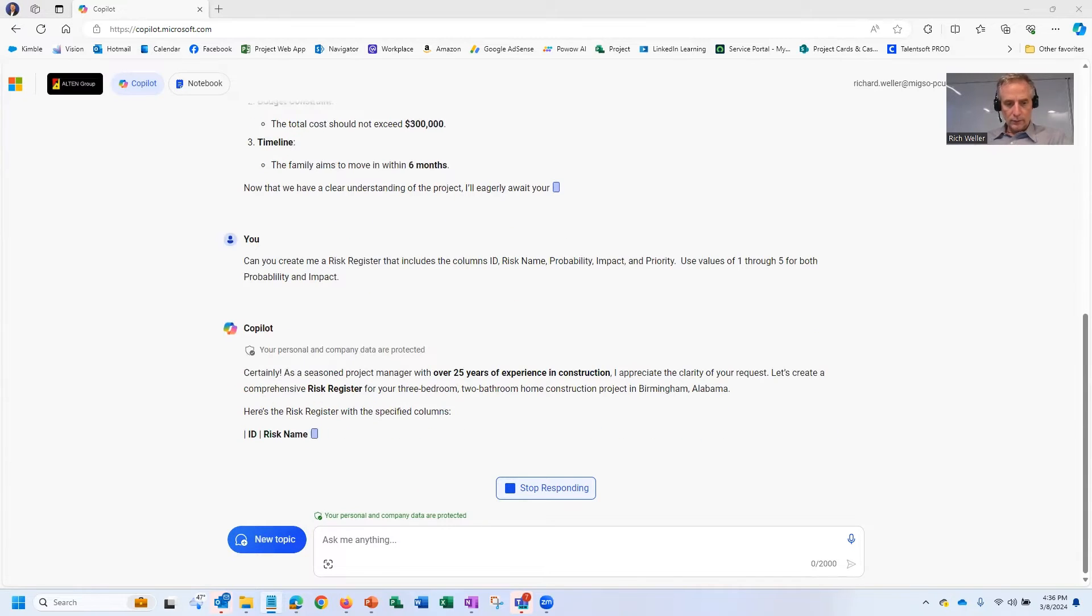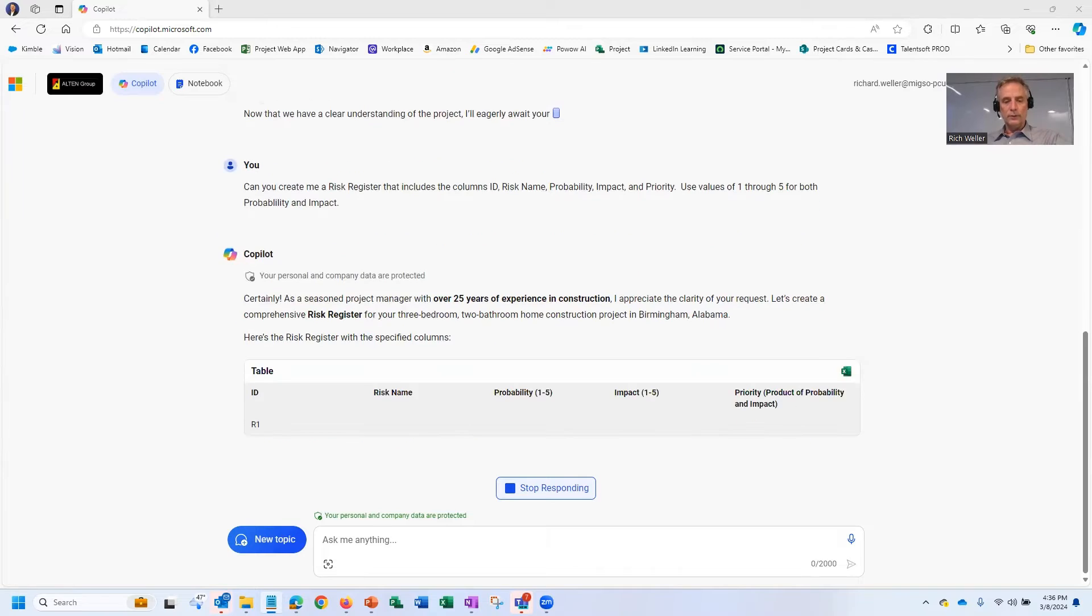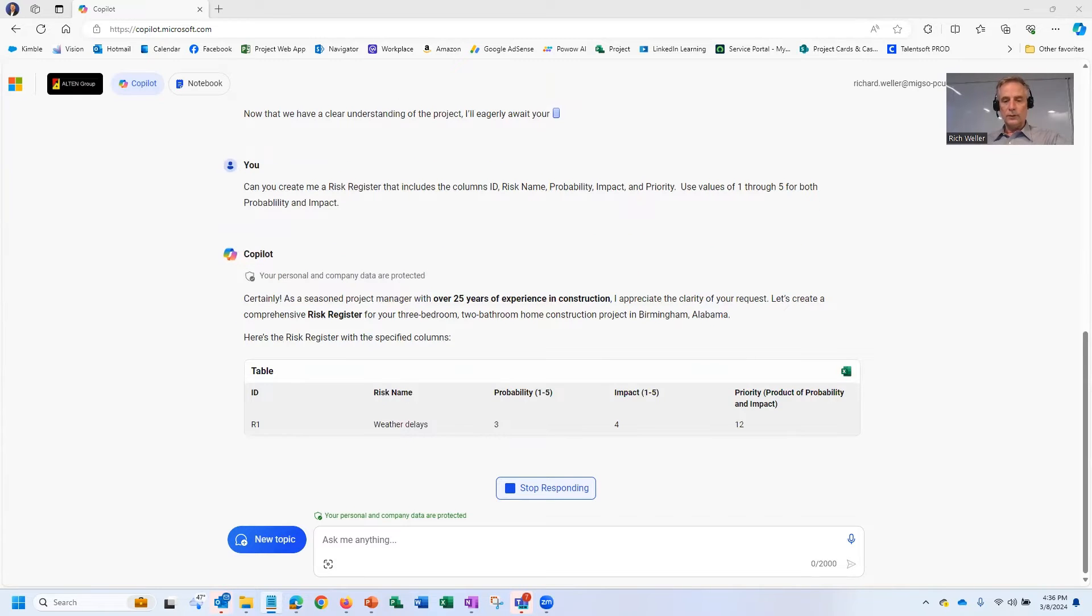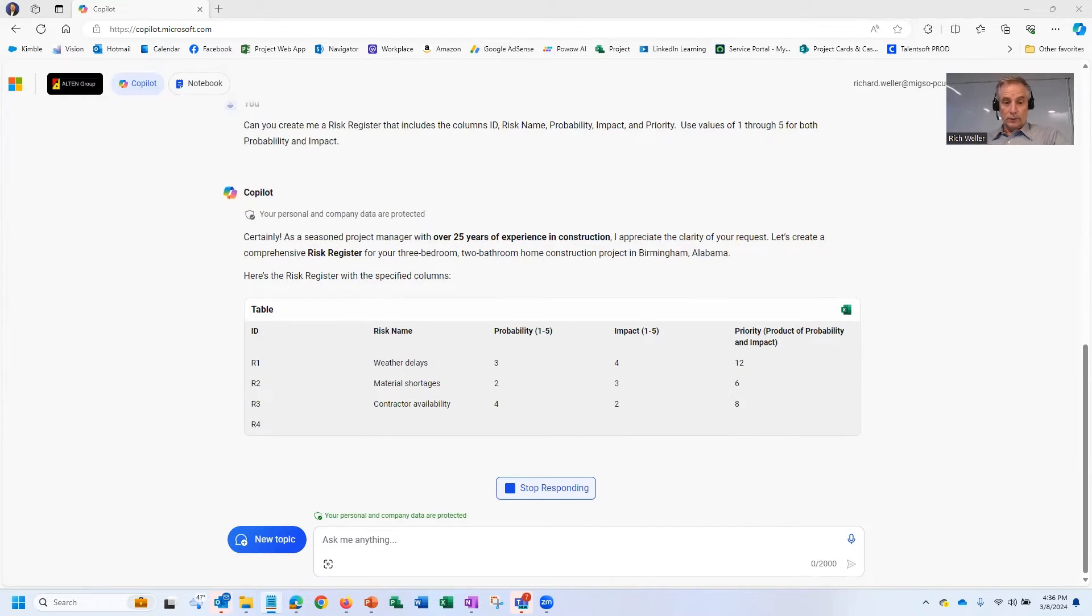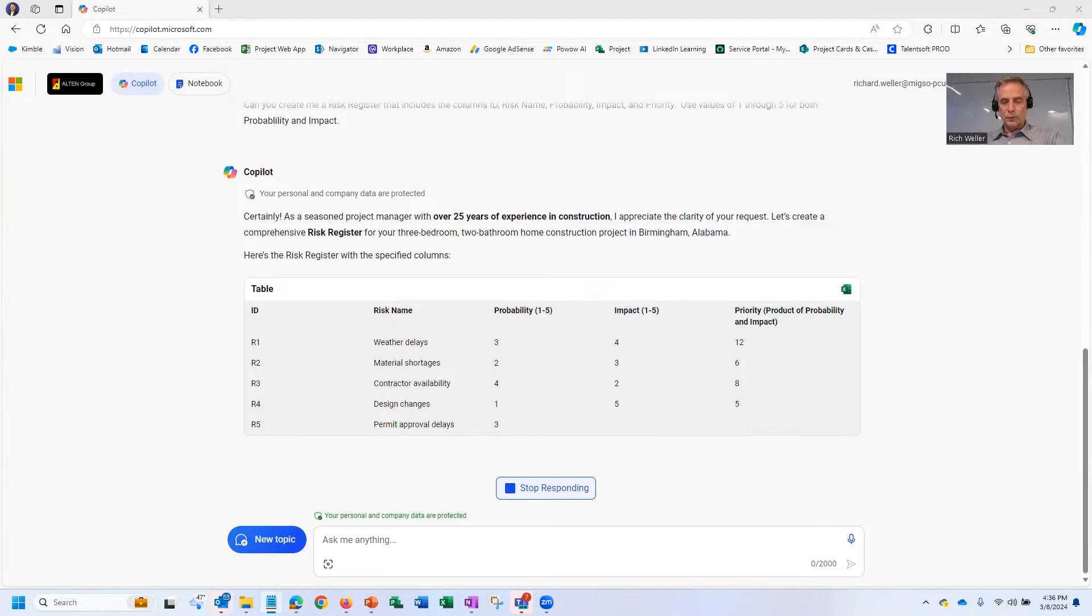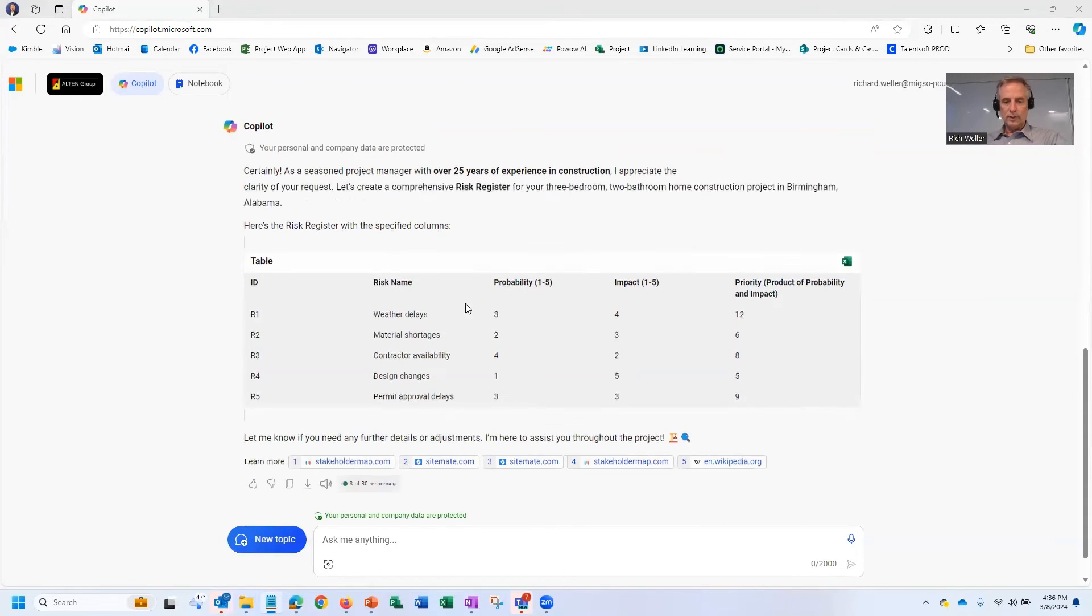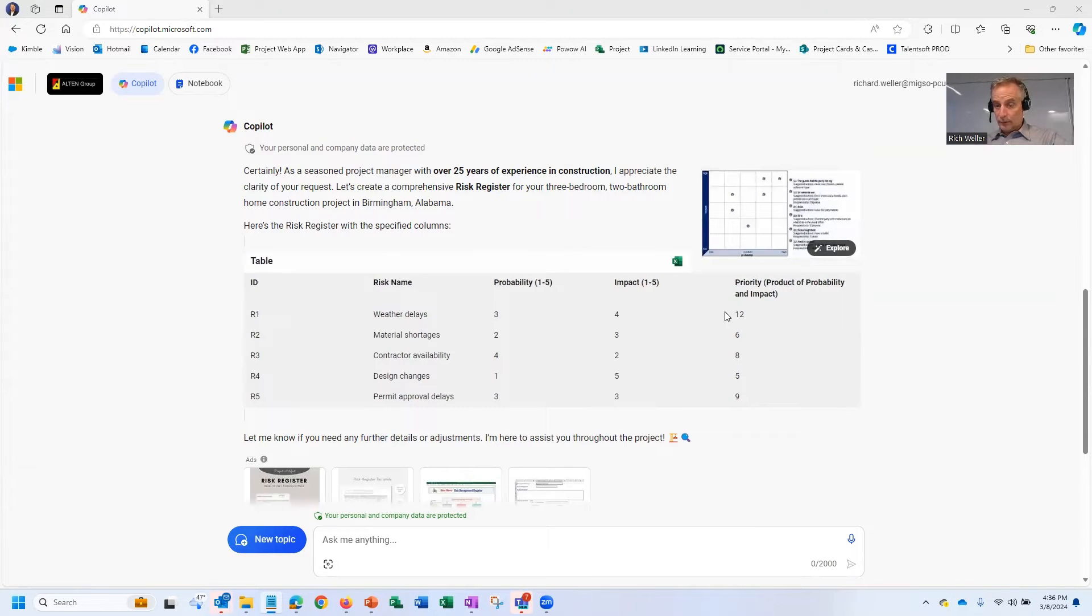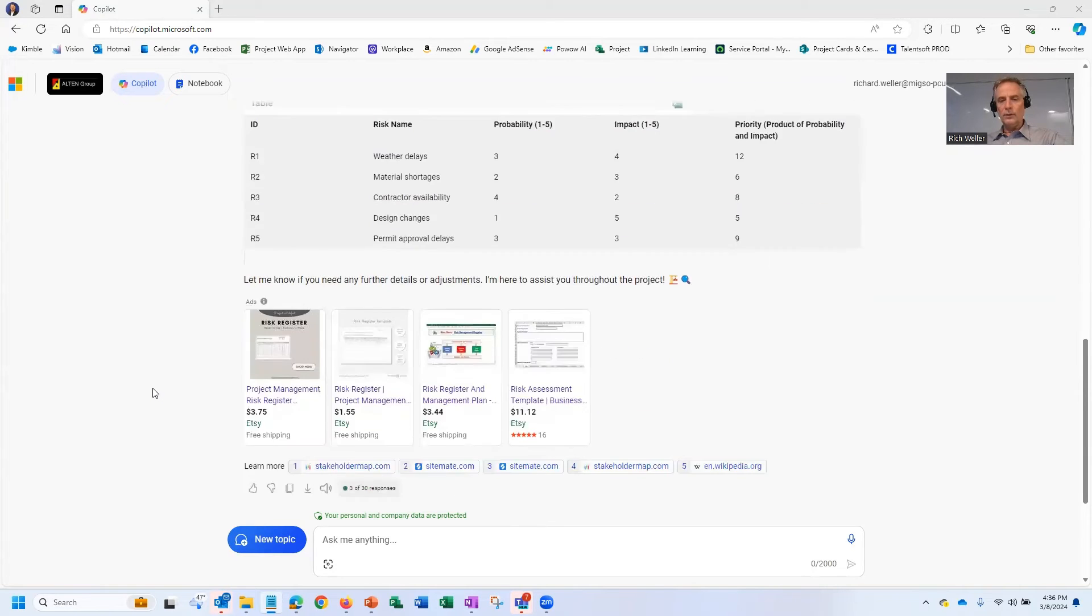And so you can see here, it's starting to build that table with those columns that we told it to use. And so you can see it's listing out the different risks that are associated with that project. It's dropping in the probability, impact. It's also putting in the priority that's based upon that probability times impact. But we're not done yet, Copilot. We need just a little bit more information.